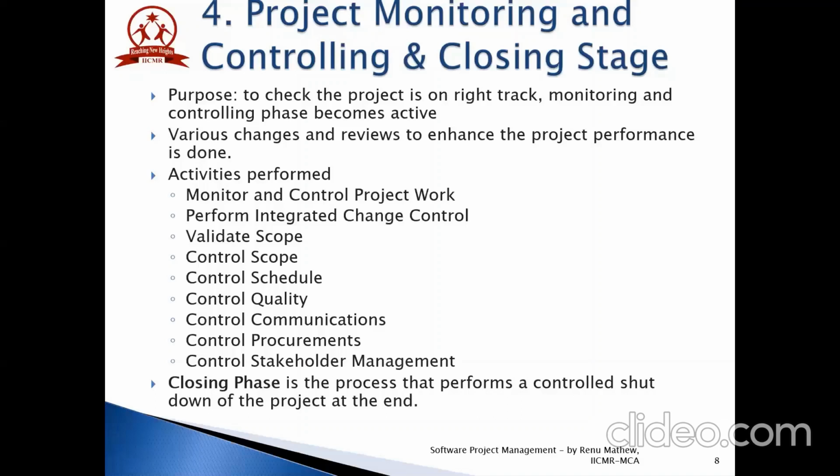So the inputs are project management plan, schedule baseline, schedule management plan, project schedule, work performance information, and organizational process assets. The output includes work performance measurements, organizational process assets updates, change request, project management plan updates, and project document updates.